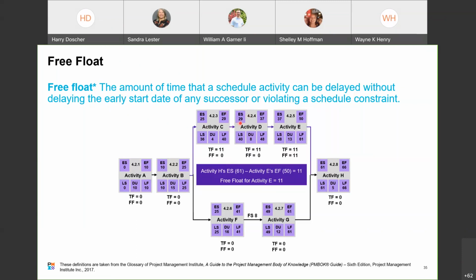What it's saying is that you finish activity C on one day, and that same day you start the next activity. So without delay, at this point, there's zero free float because activity D starts really at the same time activity C finishes. Okay.